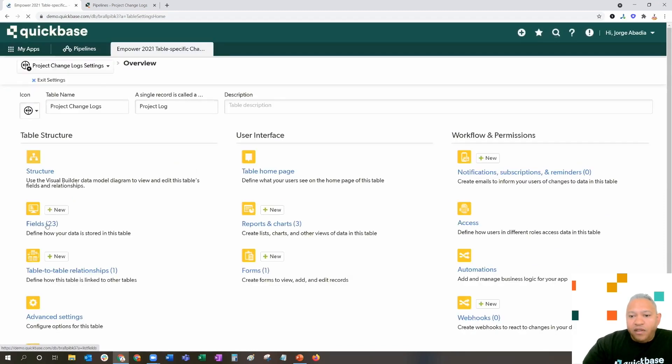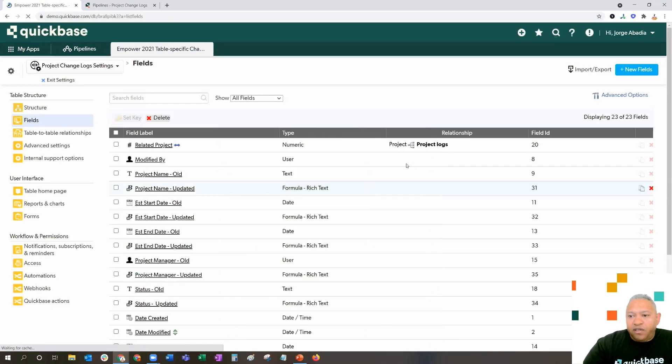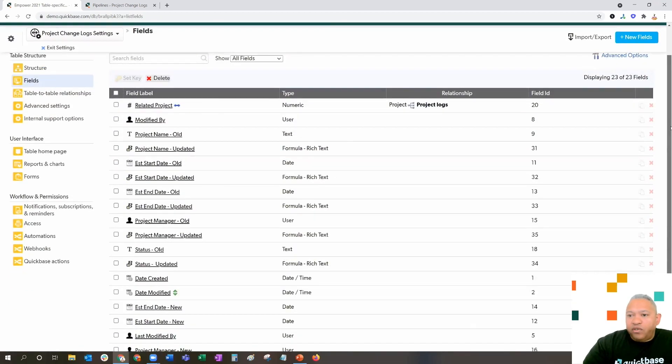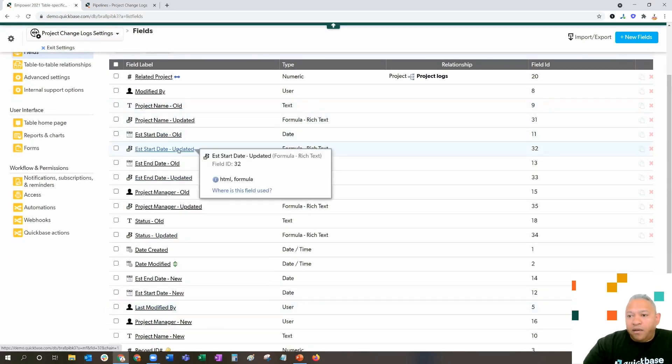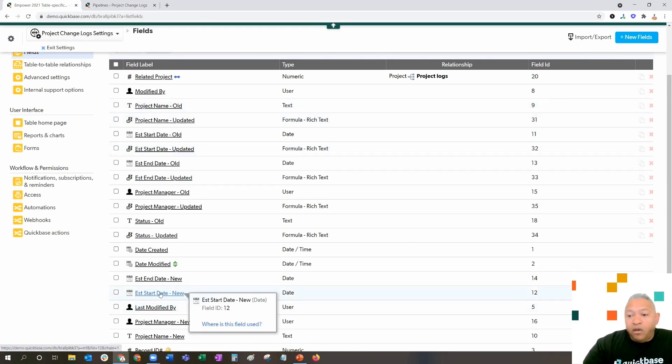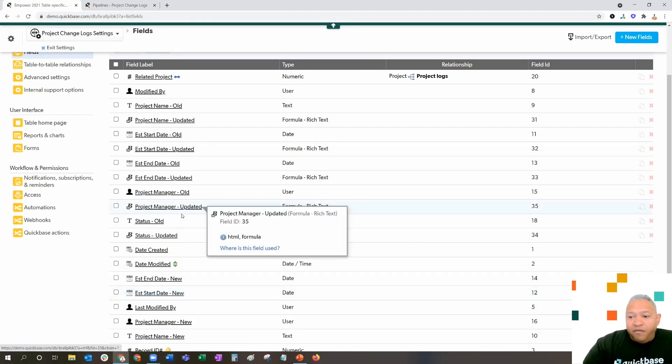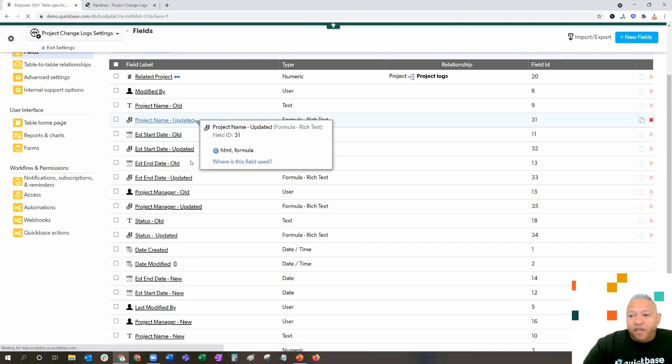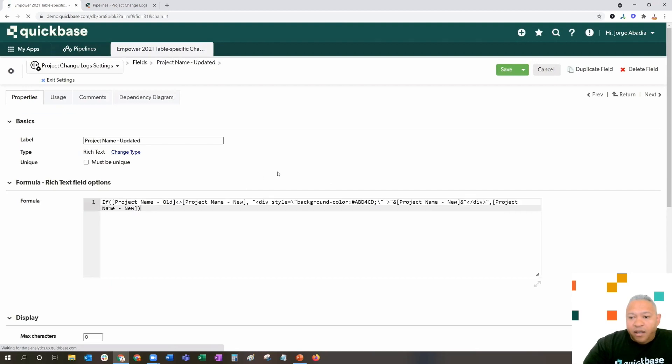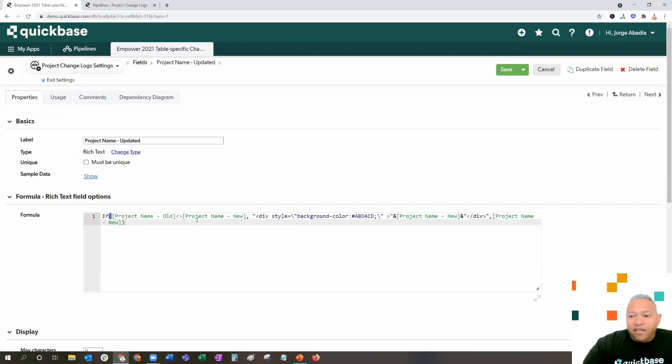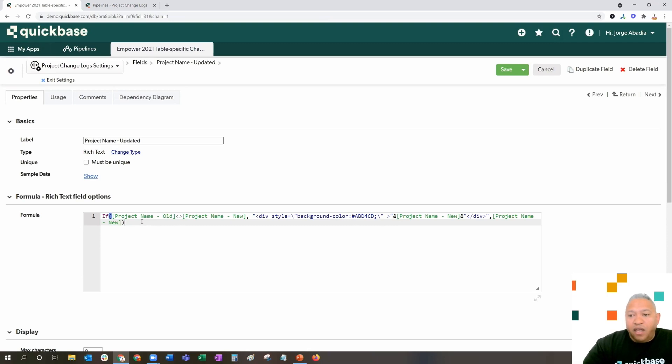How did we do this? Let's go to the settings. In the settings, in the fields area, you'll notice that we've got labels for these fields called old, new, and updated. Clearly, old and new are just simply the old values or the new value from the pipeline. The updated fields are actually formula-rich text fields that allow me to see if the old value is not equal to the new value, create a background color of your choosing.